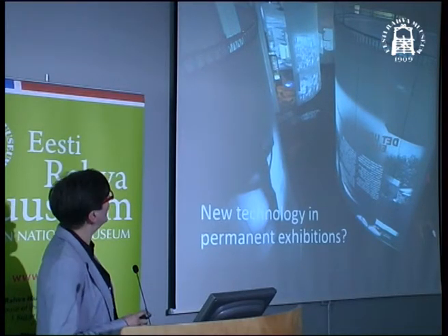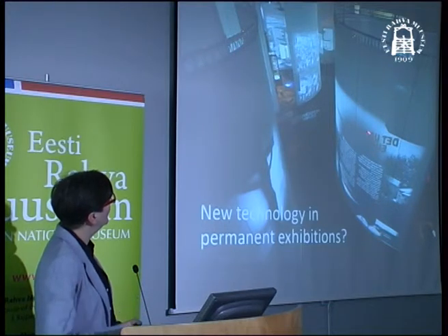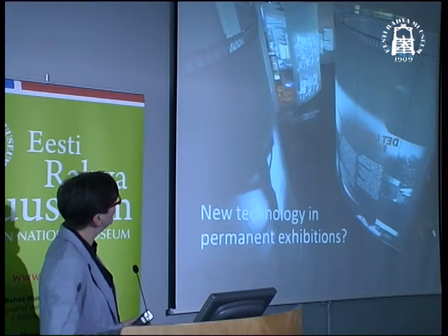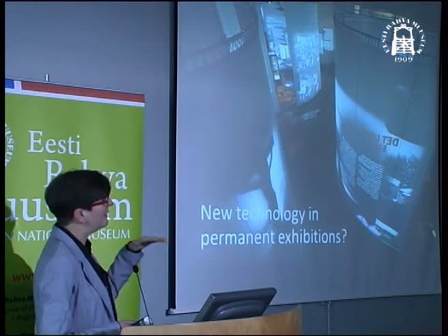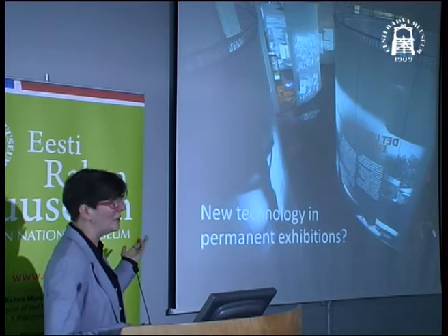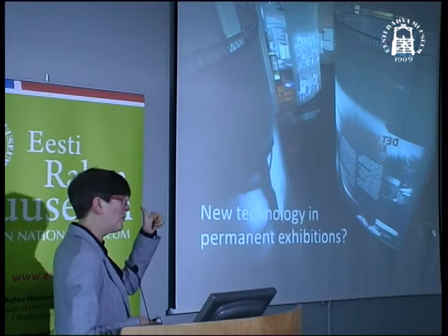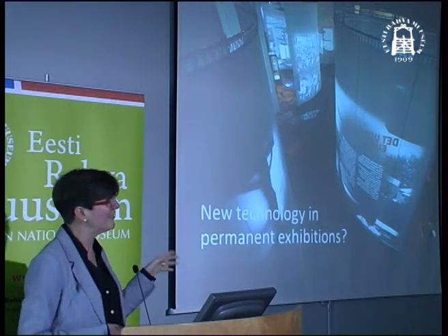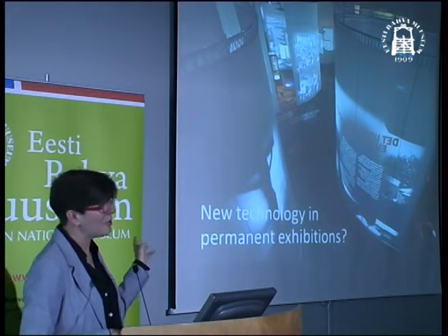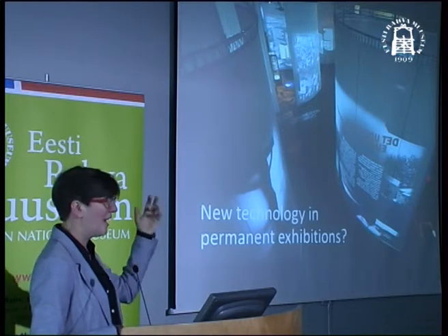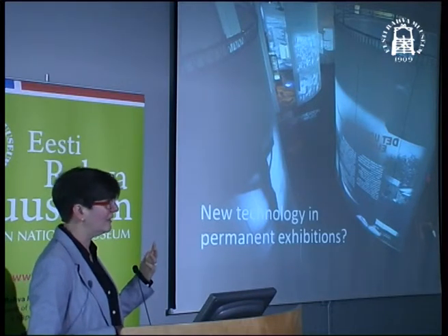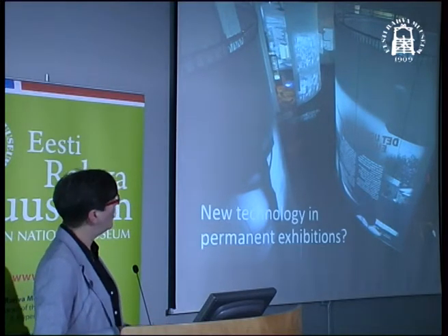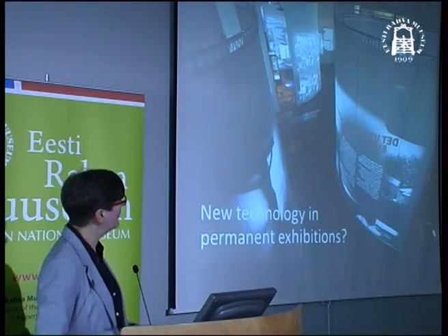So this is the first time we work with big projections with films where the things are moving around. And we get a really good response from the people, but for the AV guy, and we only have one, it's a lot of work. He gets called up in the weekends and on his vacation. So I think one has to have all that in the budget, to think there must be another person who can maintain it.